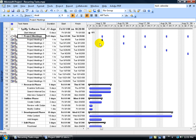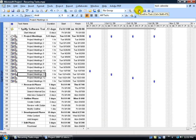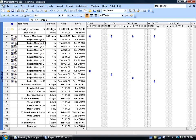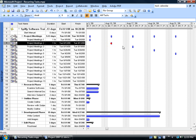In the Gantt chart, you'll notice the task shows as just one hour — small tick marks. You might see two tick marks: one for the individual occurrence and one for the summary task summarizing what's below. A cool feature: if you want to jump to a specific meeting — say meeting 11 — select it in the table, then click the Scroll to Task button on the standard toolbar. It takes you right to that task in the Gantt chart, giving you a little lead time so you can see context. You can jump between any meeting this way.